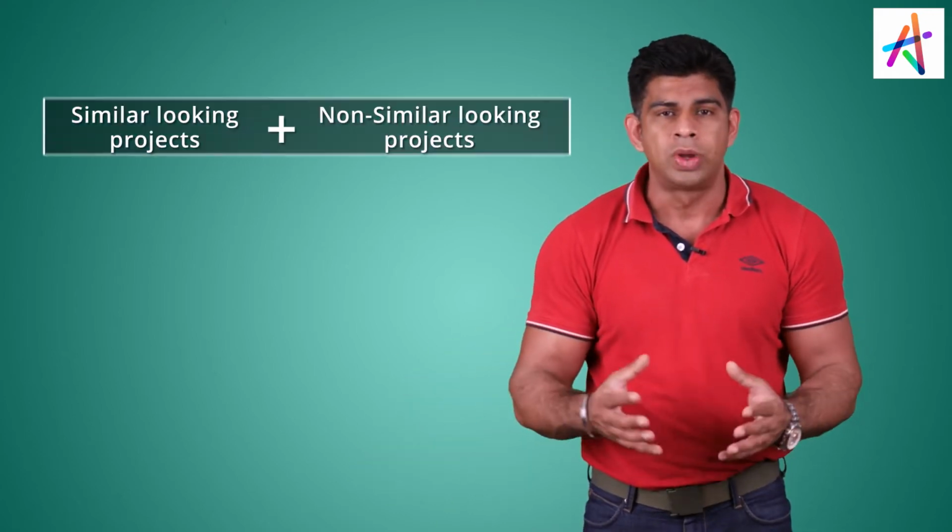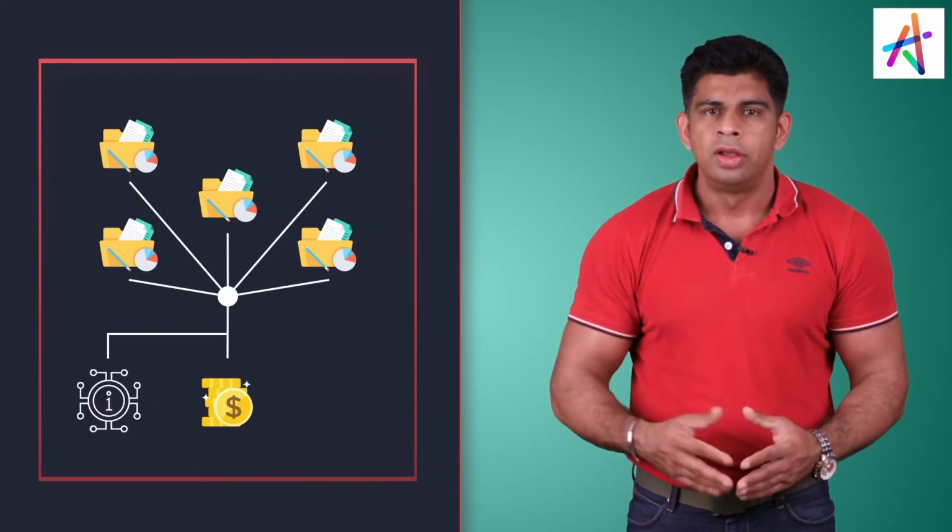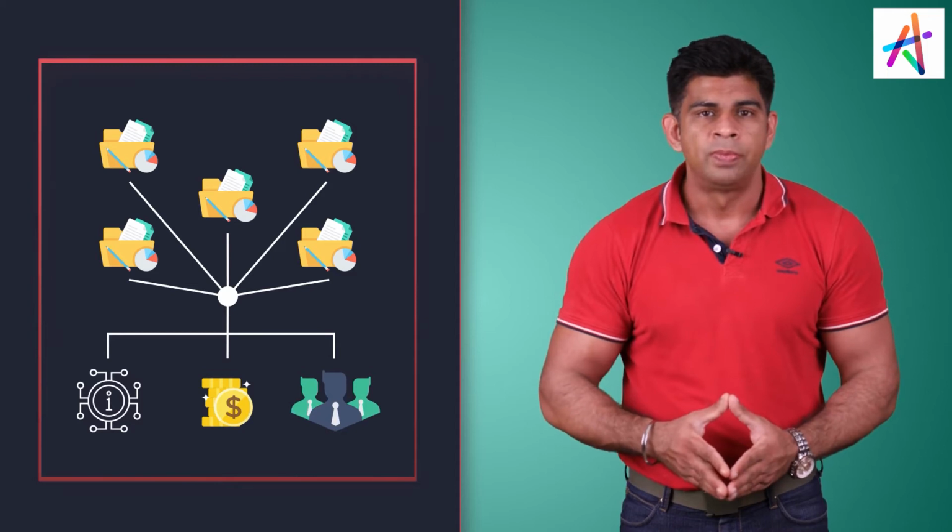What's a portfolio? Portfolio is when you combine similar looking or non-similar looking projects together for the organization and manage them under a single umbrella. For example, if let's say there are multiple projects which are competing towards the same pool of money, same resource, they're getting funded by the same business unit. That's a portfolio. You're managing them together. It might not generate any kind of strategic benefit, but they're managed together to have the ease of management. That's a portfolio, right? For example, my organization might have a portfolio of hardware, software, real estate.